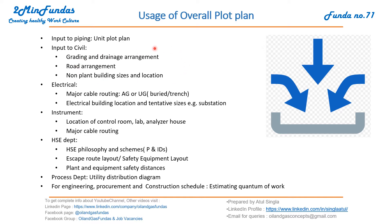Electrical will be using this overall plot plan to size cable routing — above ground, underground buried, or trench — as well as electrical building locations, tentative sizes, and substation. These things electrical can easily locate once they have the overall plot plan with them.